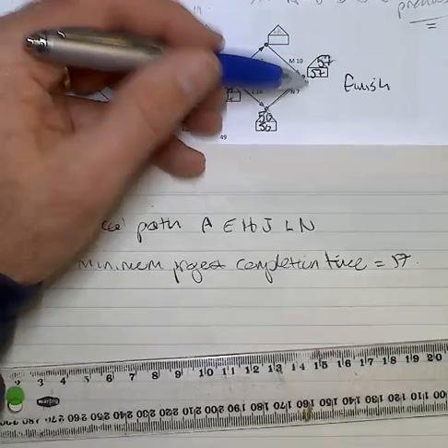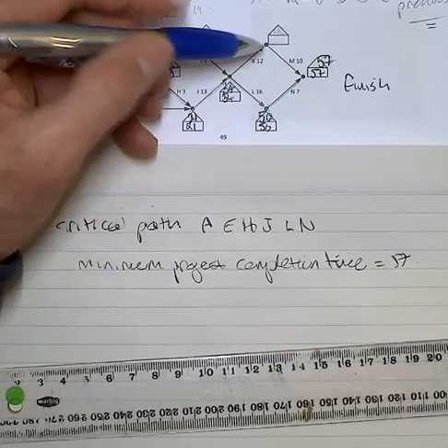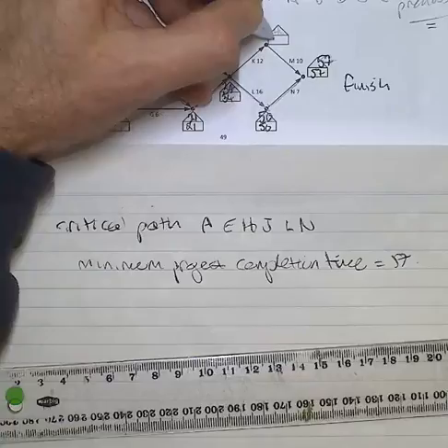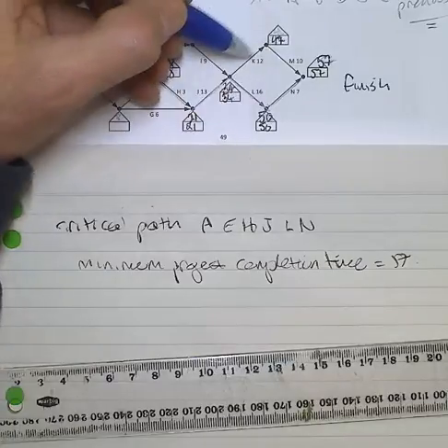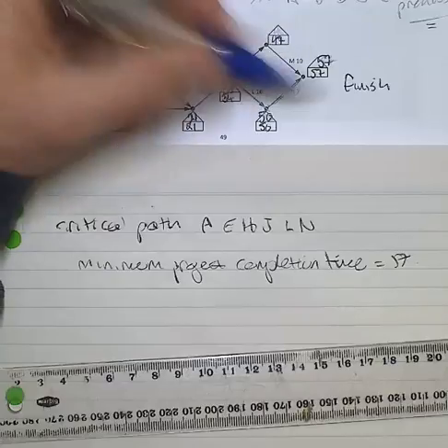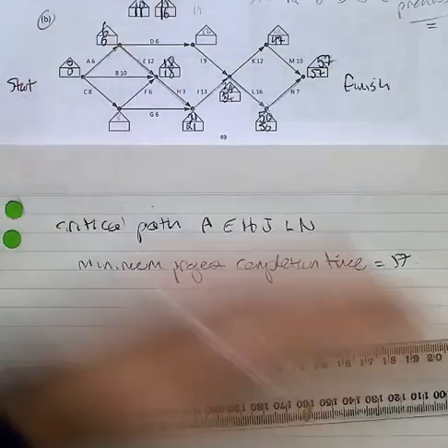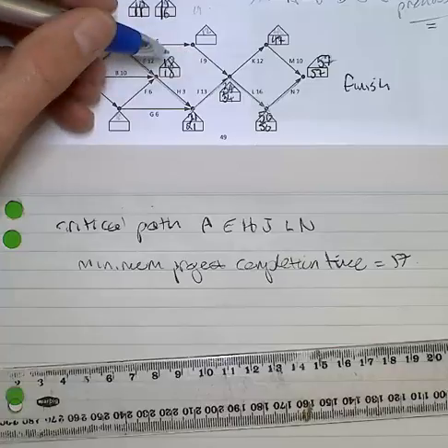You'll notice here I've got some gaps. So if I go 57, take 10, that will tell me 47. So in other words, I can finish activity K and have a day in lieu before the critical path is affected.